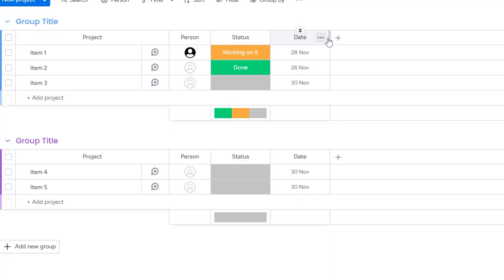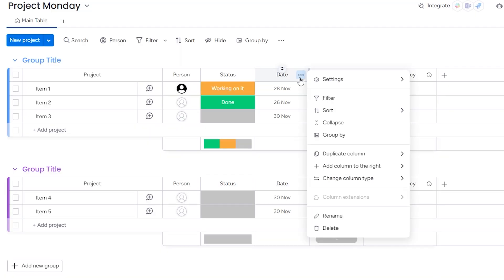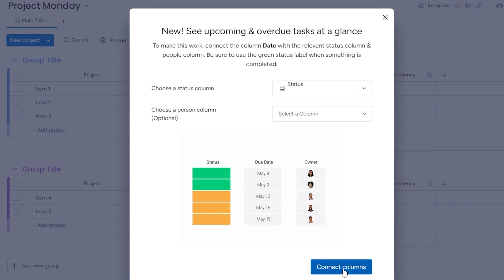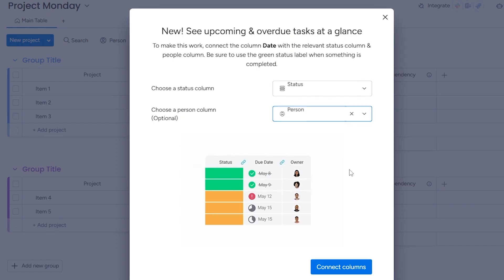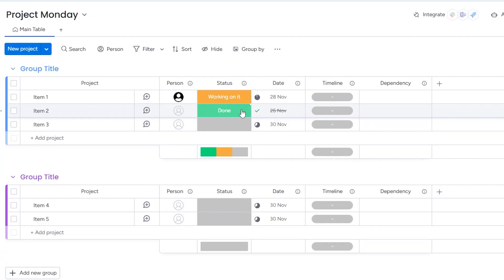Next, we need to add the columns we need to work with. Click the plus button in the column header section and add a timeline, which will show the dates our tasks will be starting and ending. Add dependency so we can link tasks together where necessary. And I'll convert the date column to become a deadline date, which looks at the status field to see if a task has been marked as complete or not.